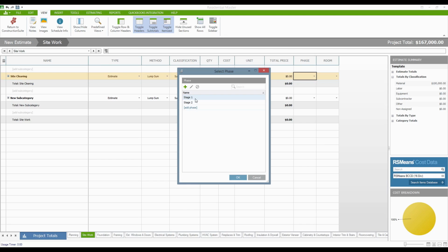But I've also got some clients that build hotels, or build out existing hotels. So they'll go in there and they'll gut a lot of the existing rooms. That's all part of the demolition phase. And then as they start rebuilding the contents for these rooms, they'll typically go floor by floor. So those become phases as well. It could be the first floor, second floor, third floor. And then on each of those floors, they'll number each of the rooms. Typically they'll go from A through however many rooms they have on the floor, just so that they can say, this is floor 2, room AA, or something like that. So you'll see that information coming together.